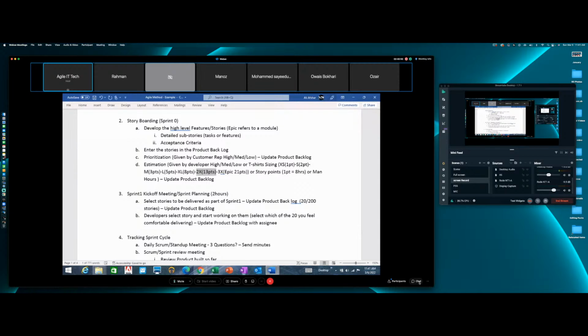You understand? For example, for our KBR 1.1, authenticating using user ID and password, one guy is going to build the front end screen. One guy is going to build the back end authentication piece, which takes the front end value and compares it to the back end. So that story will be divided into subtasks.